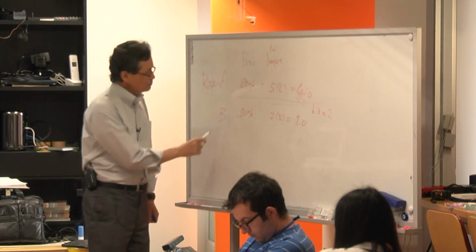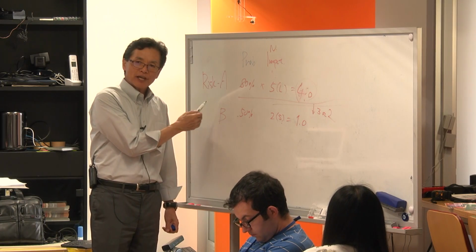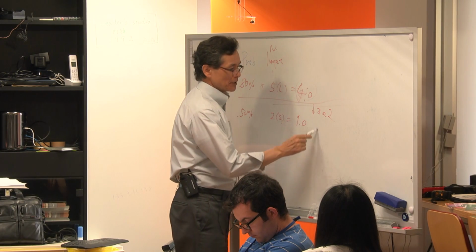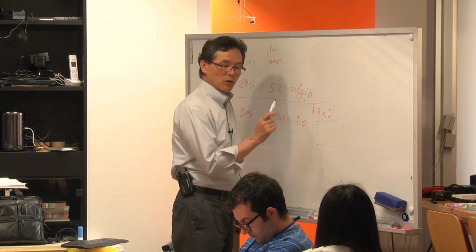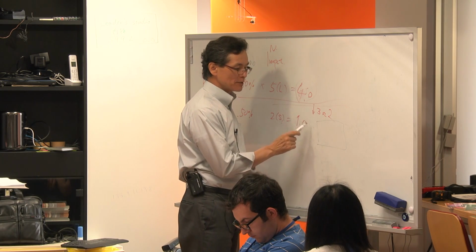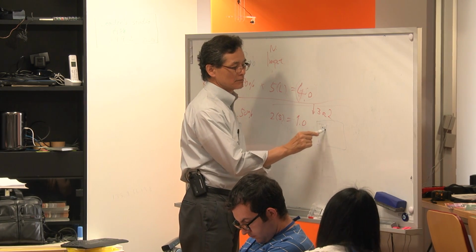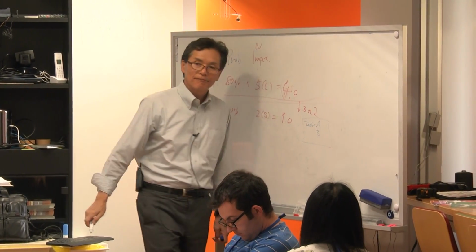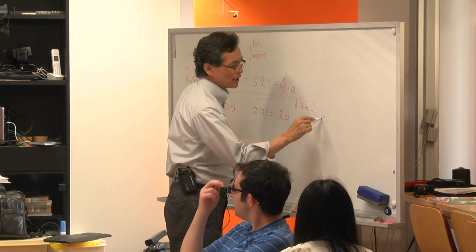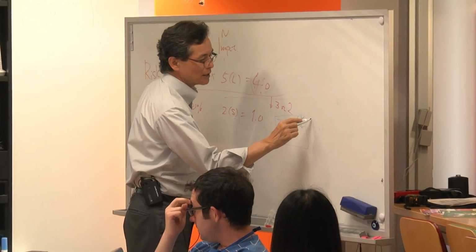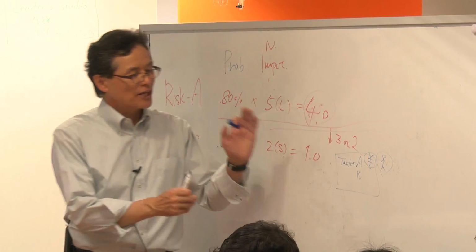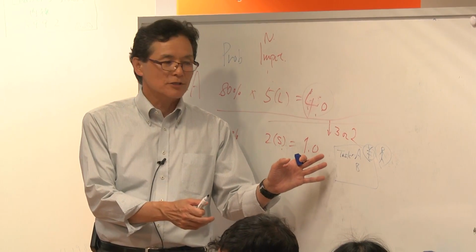But in real life, this may be actualized. This may happen in your project going forward. In that case, you can prepare a post-mortem countermeasure. What should you do once this happens? Task A, B. And extending your imagination, you can think about how much money or effort you may need to execute as countermeasures.